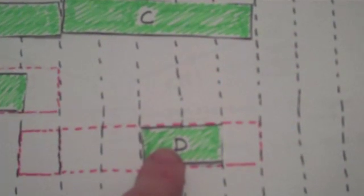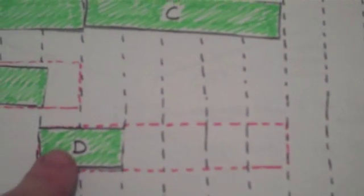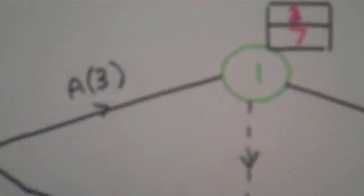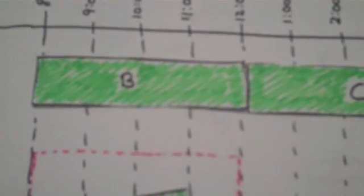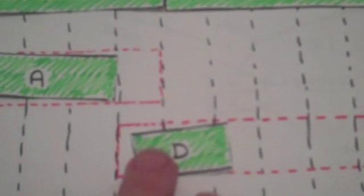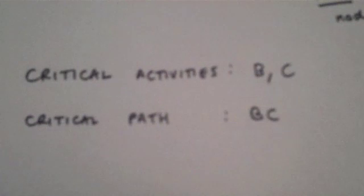Here B and C are fixed. For D, I can start it at 3, 4, 5, 6, or as late as 7 hours and still complete the project on time — so I can leave node 1 anywhere between 3 and 7. That's what those 3 and 7 values on node 1 mean. At the start, I must begin at time 0; if I leave an hour later, the project is delayed. So my critical activities are B and C, and the critical path is B to C.